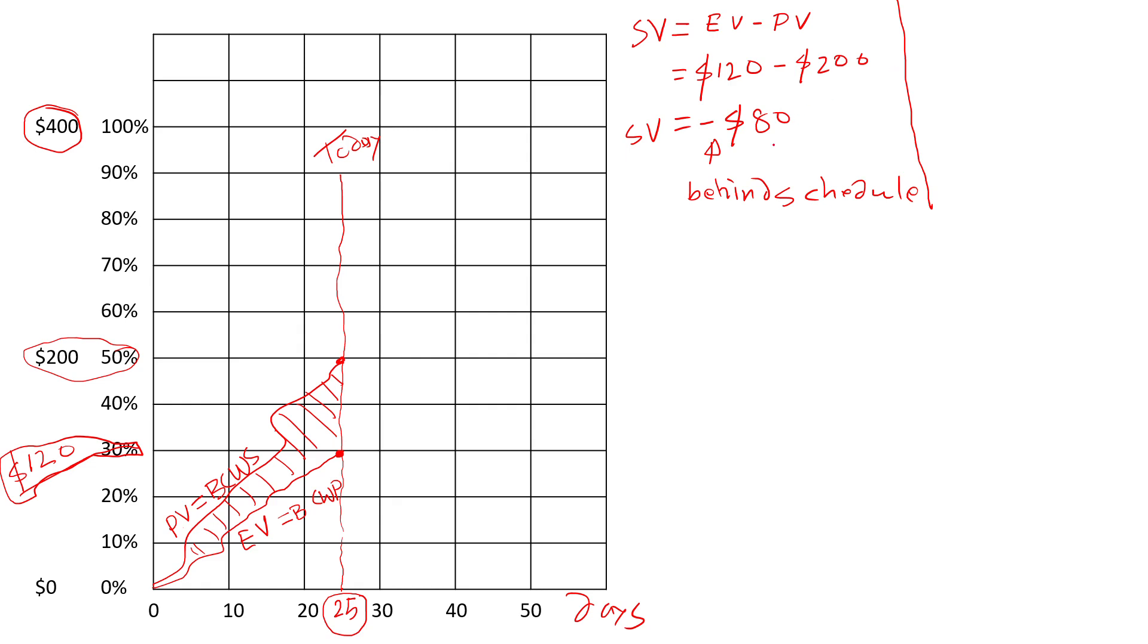A lot of times people, instead of that, use something called index, which is easier to understand, called the schedule performance index. Instead of subtracting, you just simply take the ratio of these two. If the ratio is less than one, that means we are behind schedule. In this case, this is 0.6, less than one, meaning that we are behind schedule. We won't be able to finish this project on time if we continue at this rate.